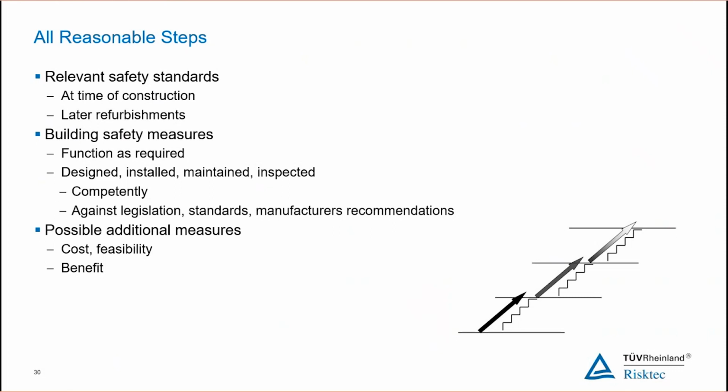How much risk reduction will we get? That amount of risk reduction is going to be directly proportional to the effectiveness of our controls. If we've got very, very good controls, putting another layer on top may only get us a limited amount of benefit, whereas putting in place another control where we have weak controls gives us quite a bit of benefit. Against that, there is the cost feasibility of putting in place those controls, the sacrifices, and we need to be weighing that up to make a decision as to whether or not those things are practicable.